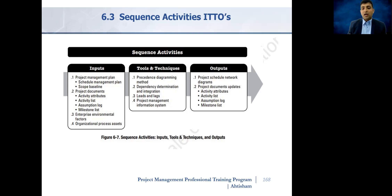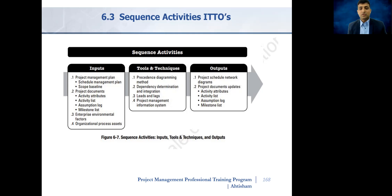Among the outputs, we have the project schedule network diagram, and we will update various documents such as the activity list, milestone chart, assumption log, as well as activity attributes.